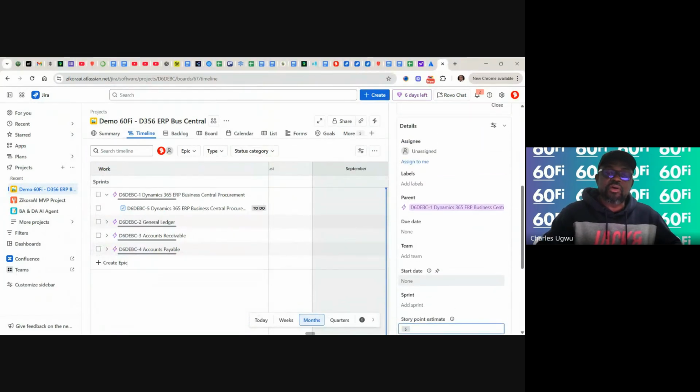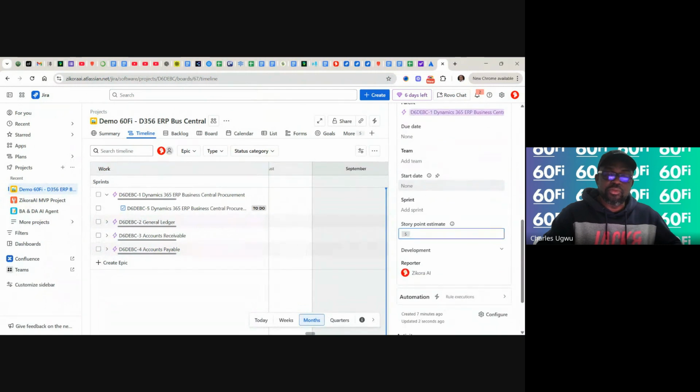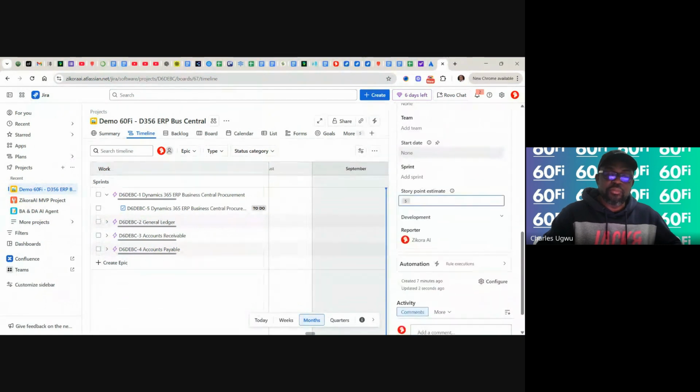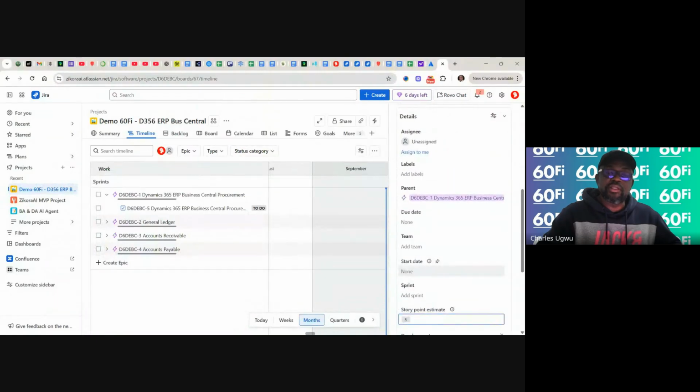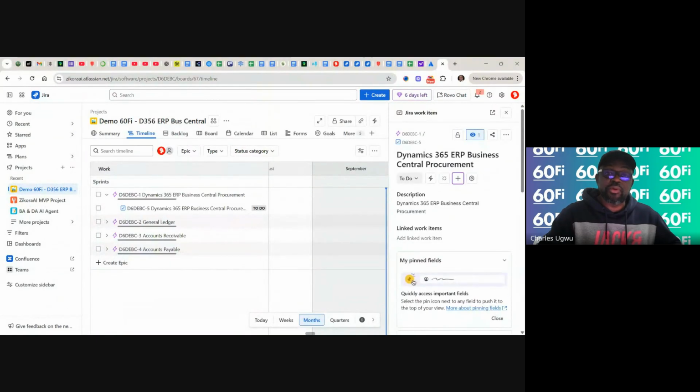It is the person that is going to do the work that gives us the story point, not you. Don't come and say this is the amount of effort, because you are not the person doing the work. And the person doing the work should be honest. When the person doing the work starts being dishonest, then all of us are developers and we'll start agitating.